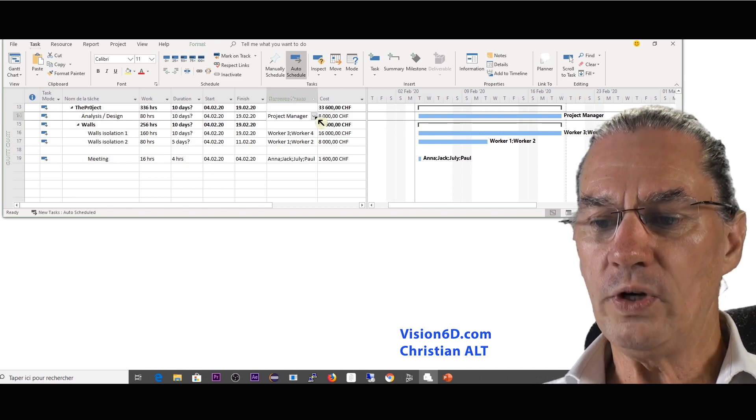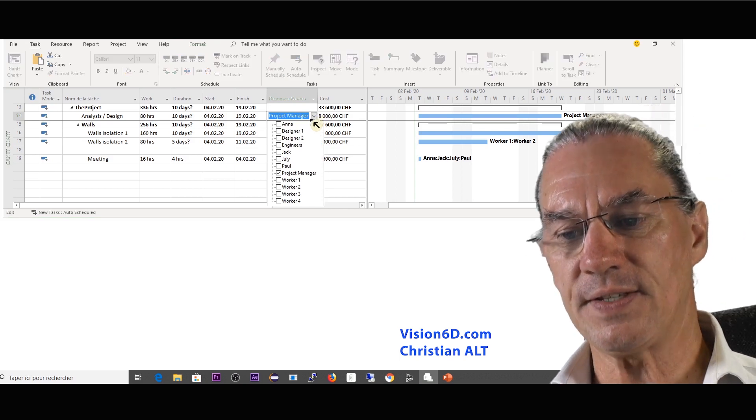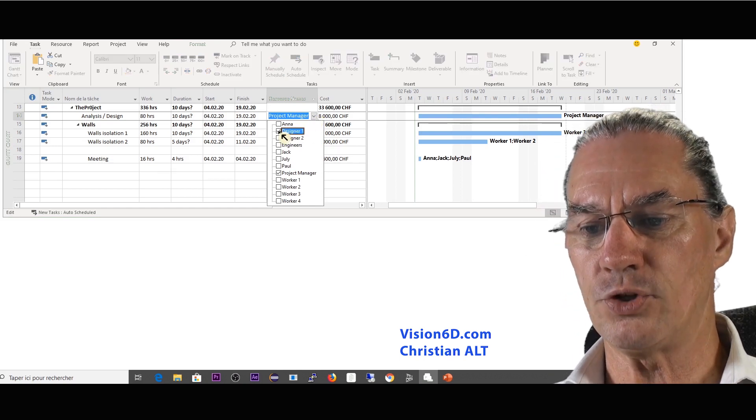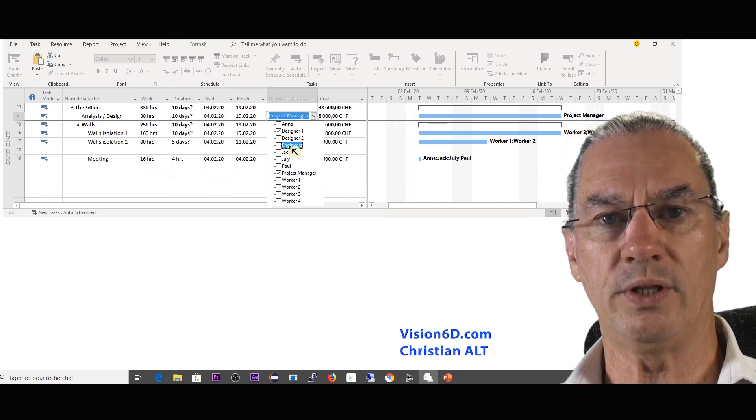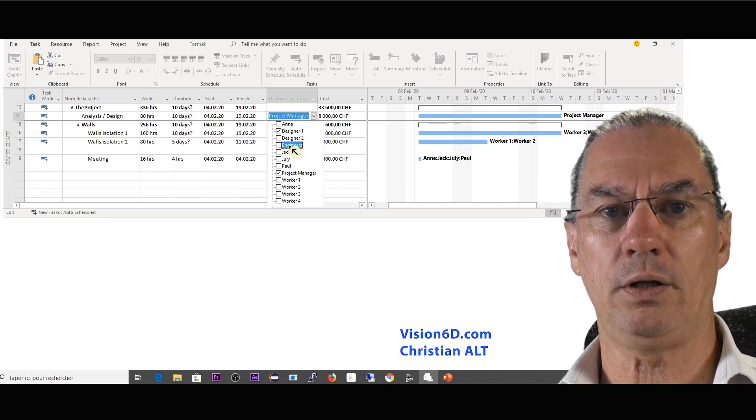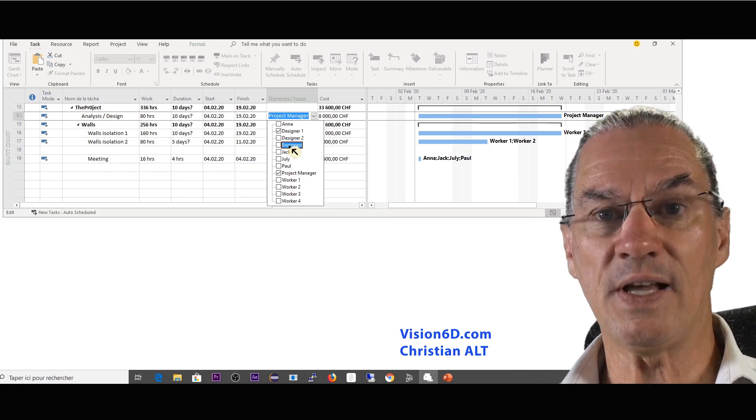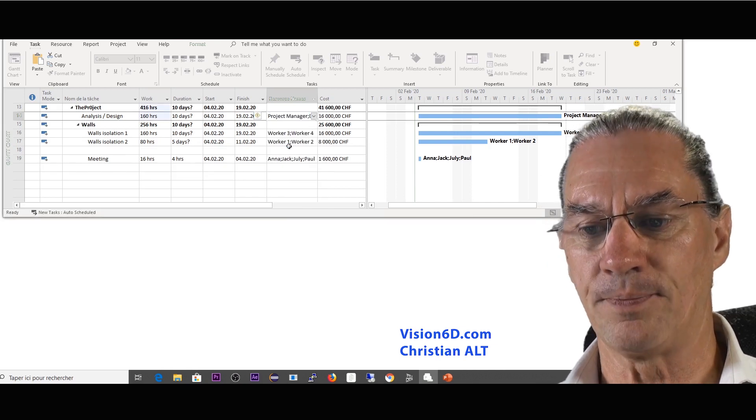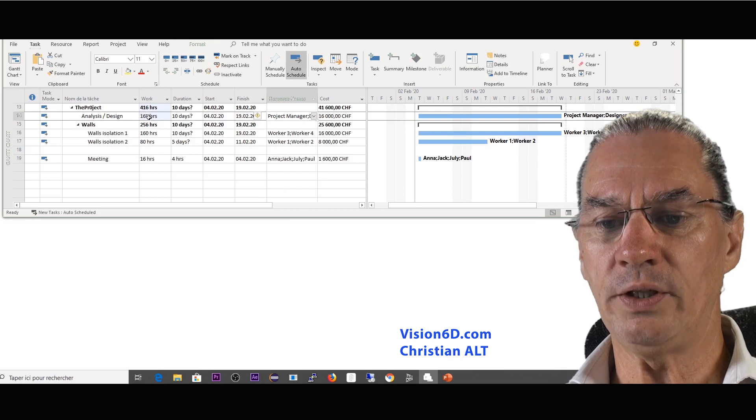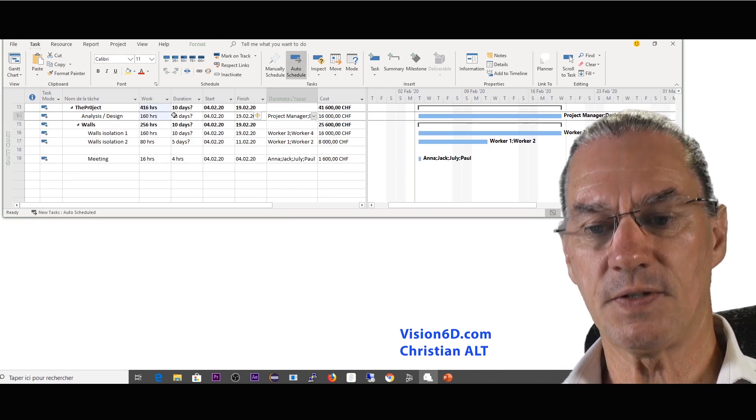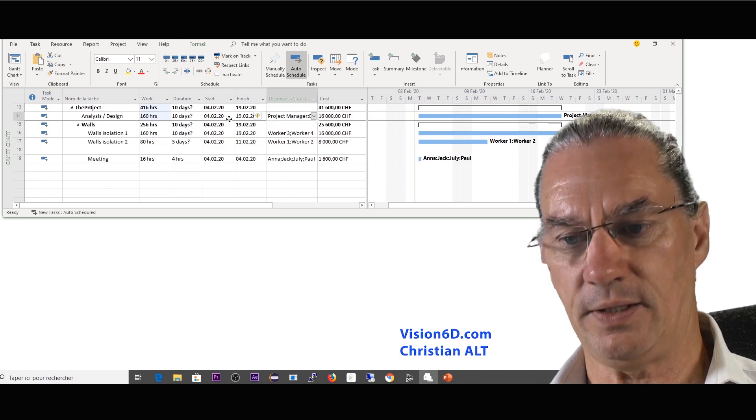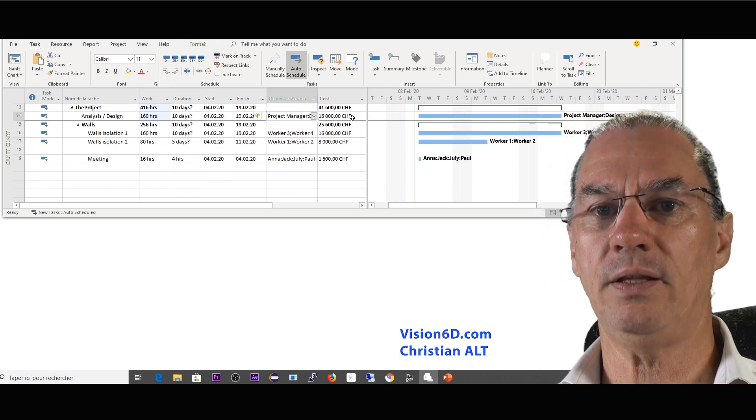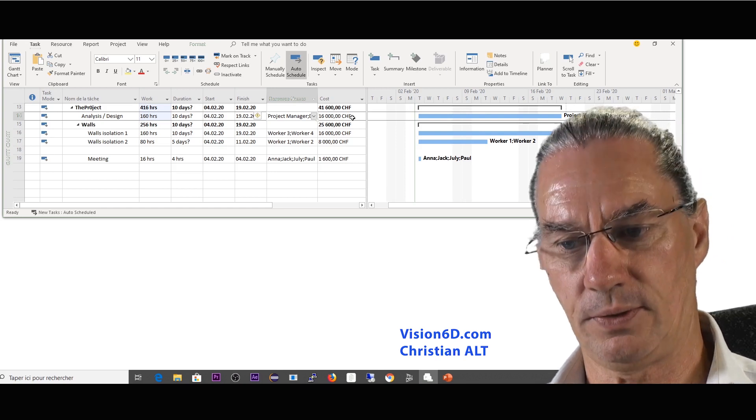So now we said that this analysis is quite complex and the project manager needs to work with the designer during that interval of 10 days. So the designer is also going to work 10 days. So we see that all in all from 80 hours it went up to 160 still over the same 10 days, but the cost has jumped from 8,000 to 16,000.